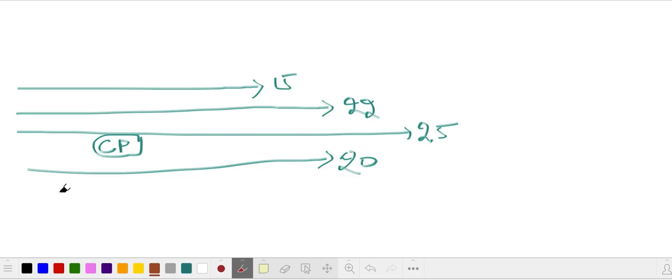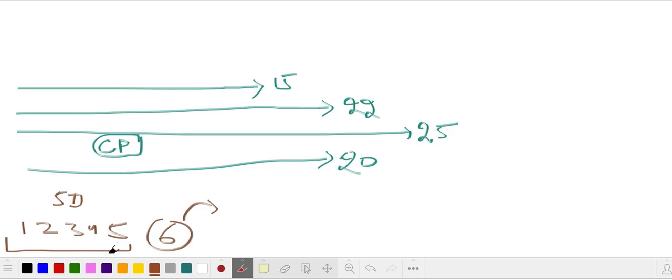It means suppose I've got 5 days to do a task, 1, 2, 3, 4, 5, and on the 6th day a new activity has to be started, which depends on this activity. I have a total of 5 days to do that. It's my wish if I start on the 1st or 2nd. Suppose I start this activity on day 4, the first 3 days I just rested, but I have to make sure that if it's starting late, it's not ending late.